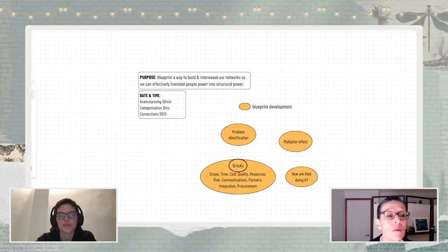Let me see. Yeah, and here's where one of the ways I start thinking about it is, what is the logical sequence of events? Whatever that logic might be, it might be, oh, because I need this thing first, and then in order to produce this other thing, or it might be because you're just one person and you just can't do more than one thing at a time.